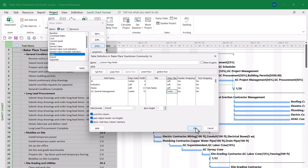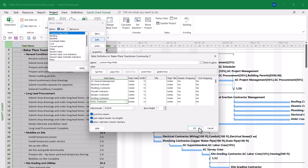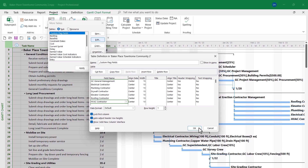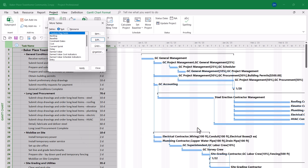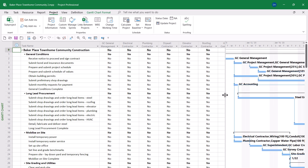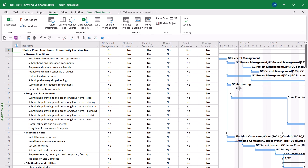I'll need to add each of those additional flag fields to this table. I've taken the liberty of adding each of the custom fields to the table — you can see the last one I added is HVAC Contractor. Before you close the Table Definition dialog, be sure to select the checkbox called Show in Menu, then click OK. In the More Tables dialog, select your new custom table if necessary, then click Apply. Finally, drag the split bar over to the far right edge of the last column, which is the HVAC Contractor column.